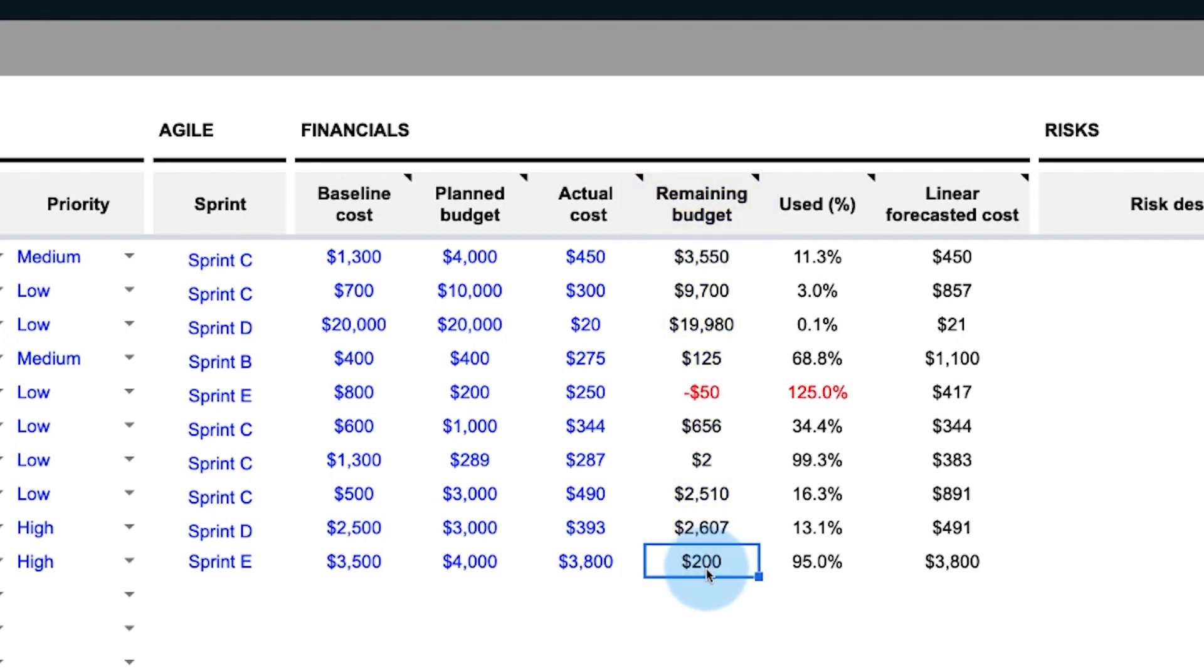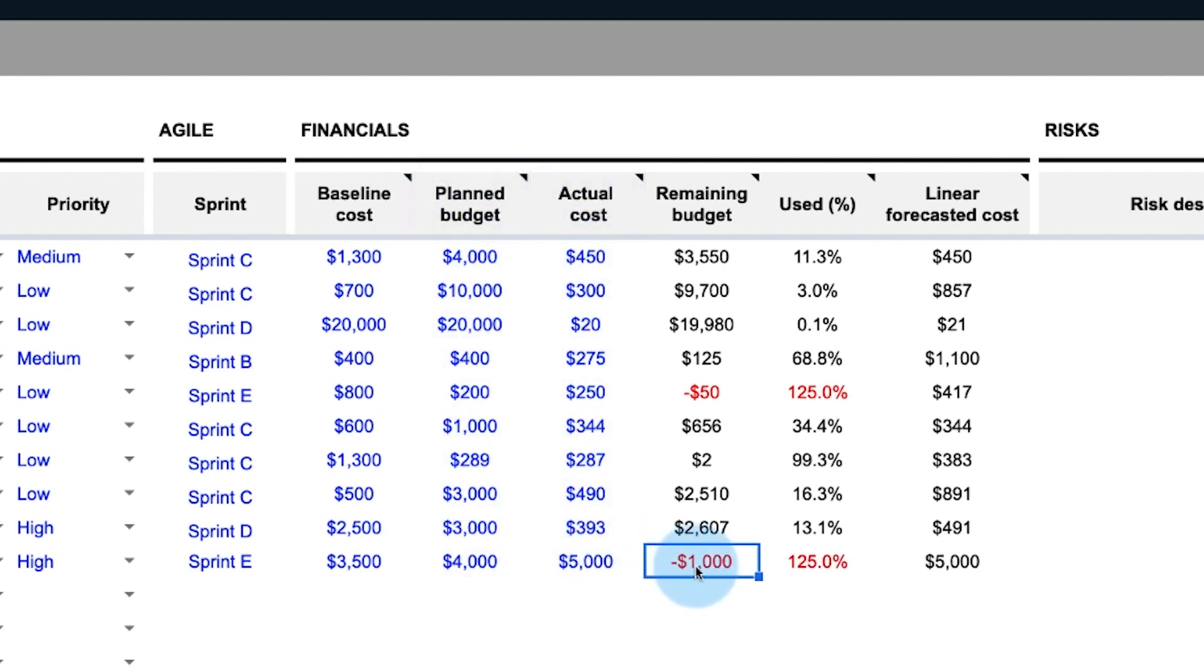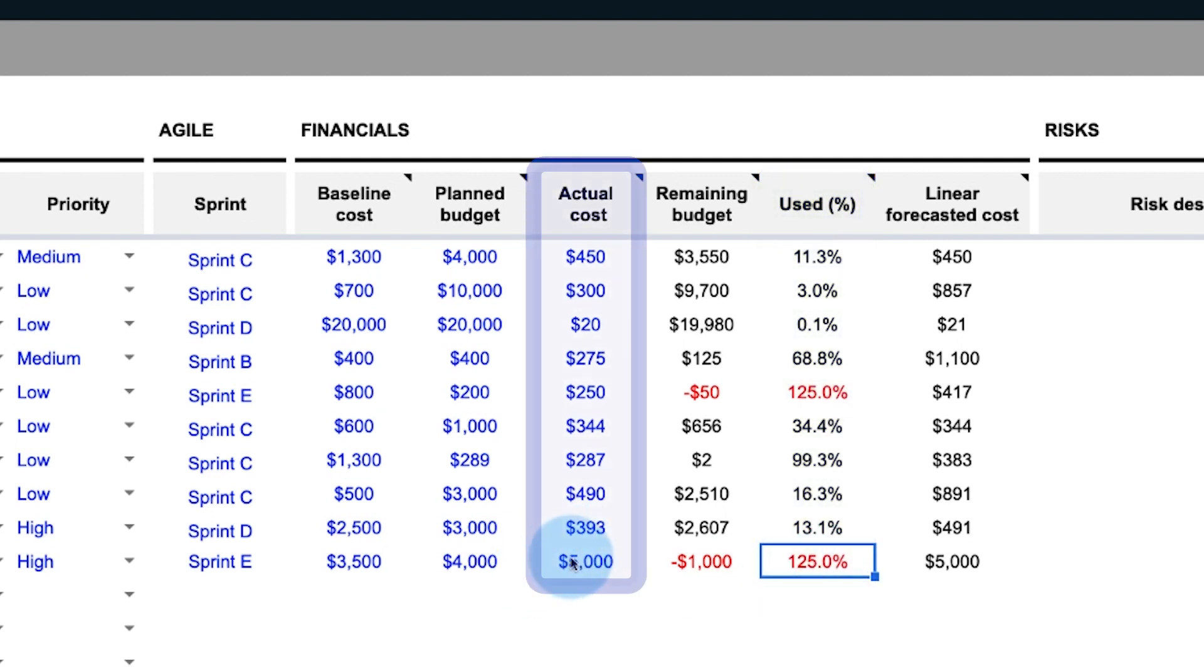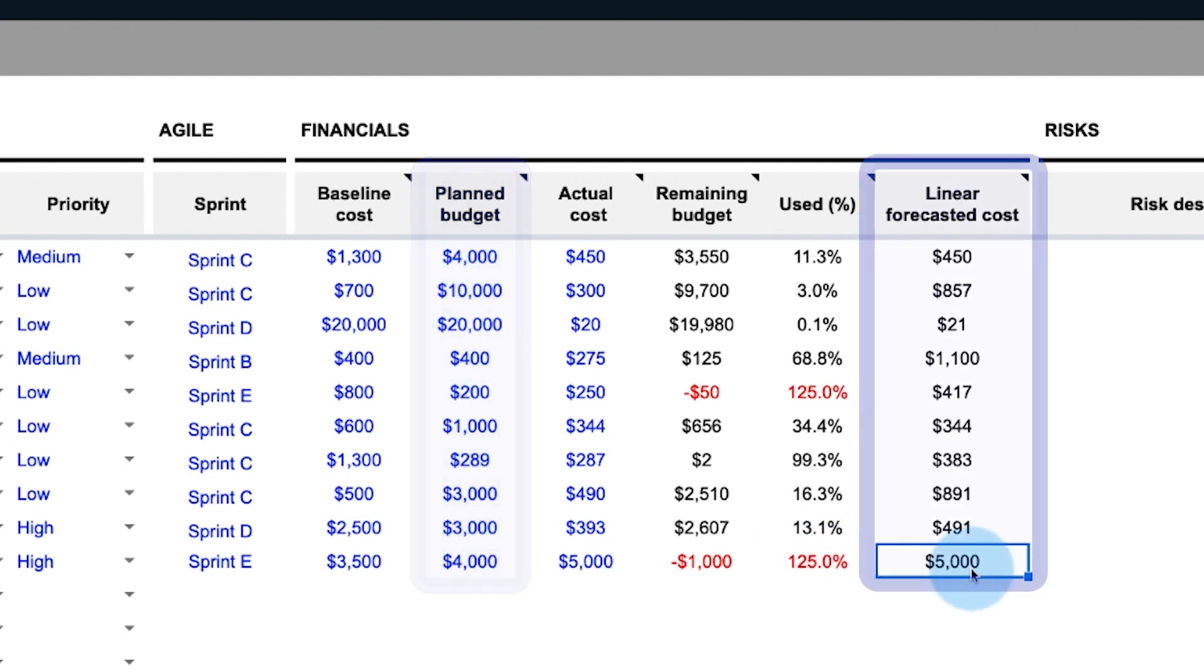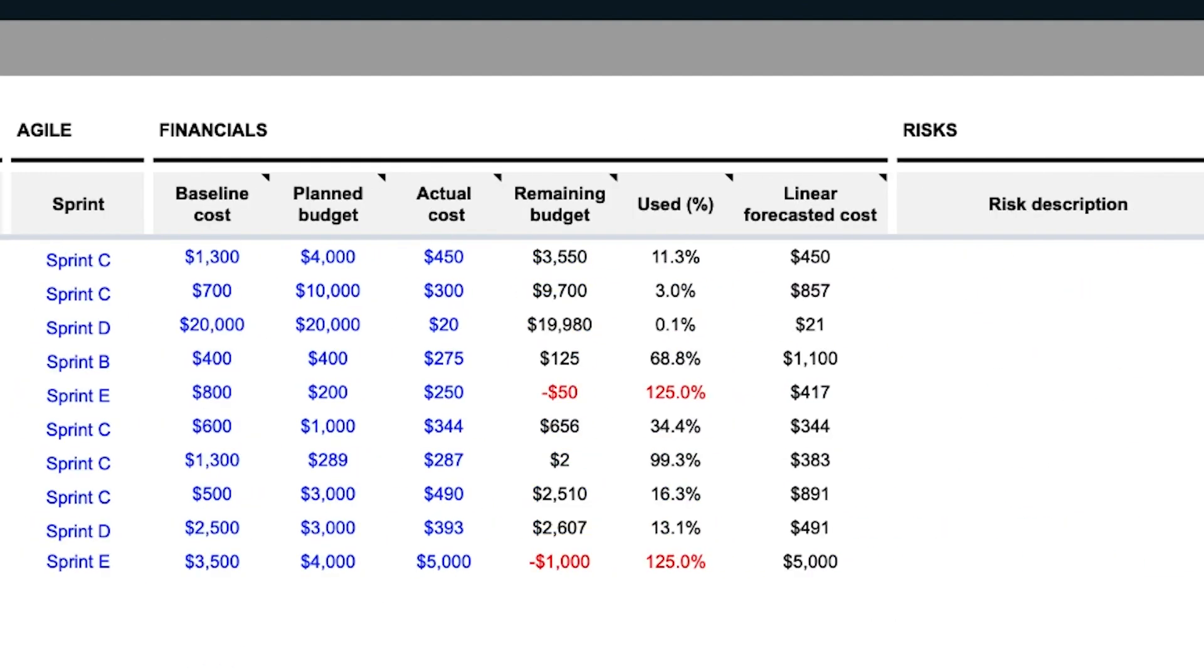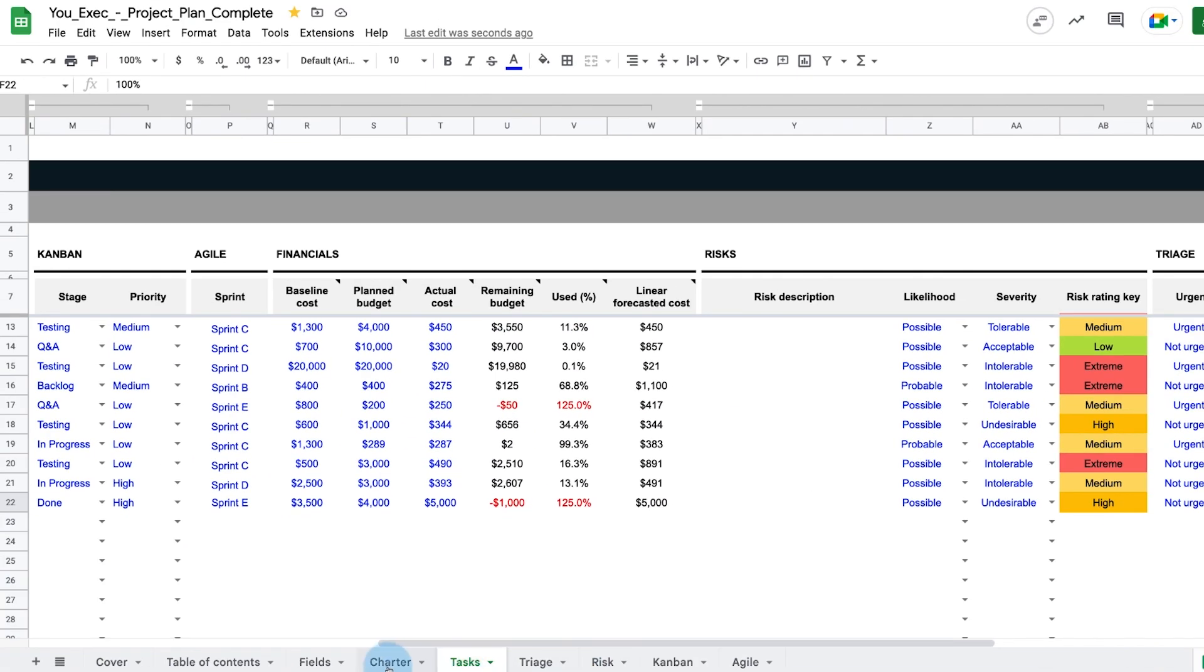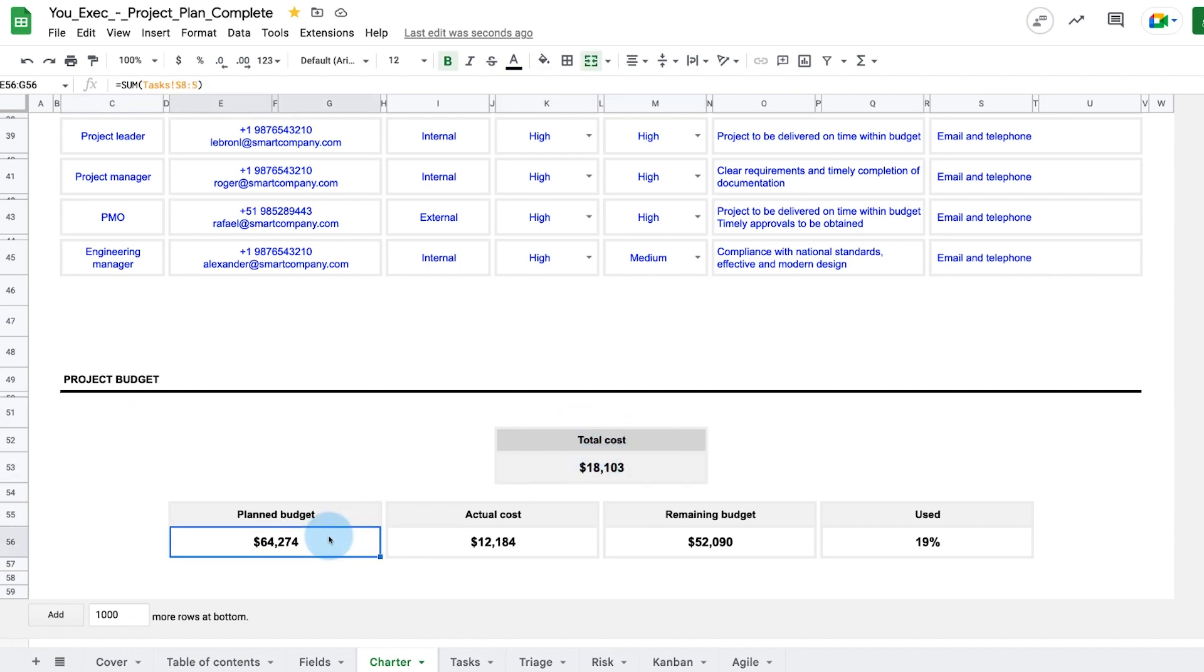The remaining budget is the amount of money from your planned budget remaining. This is calculated by subtracting the actual cost from the planned budget, and if it's negative, that means you've gone over budget. The used percent is calculated automatically by dividing the actual cost by the planned budget, and the linear forecasted cost divides the actual cost by the work progress percentage to determine what the overall project is likely to cost.